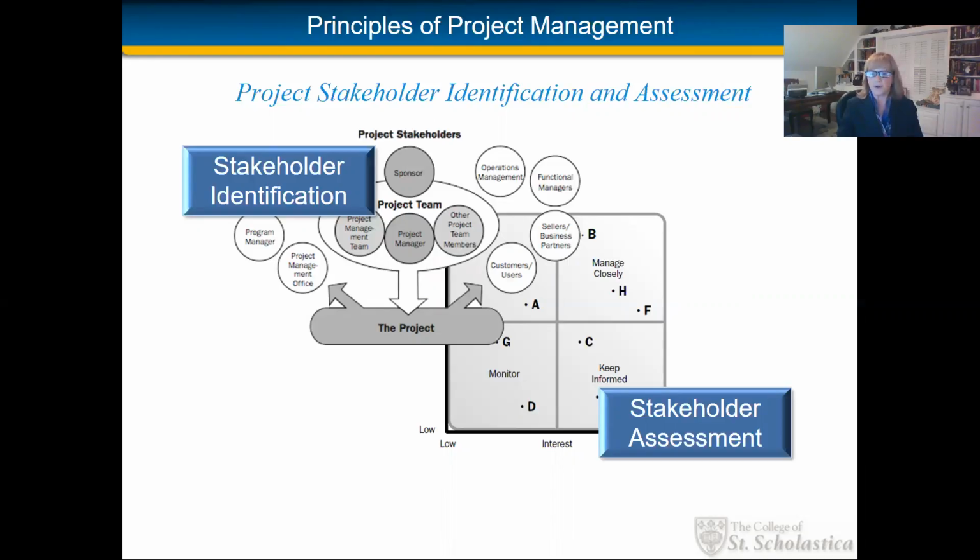The Identify Stakeholder process is the process of identifying the people, groups, or organizations that could impact or be impacted by a decision, activity, or outcome by the project. You learn about your stakeholders by analyzing and documenting information that's relevant to the stakeholders' interest, involvement, interdependencies, influence, and potential impact on project success. The major inputs for this process are the project charter and the project procurement documents.